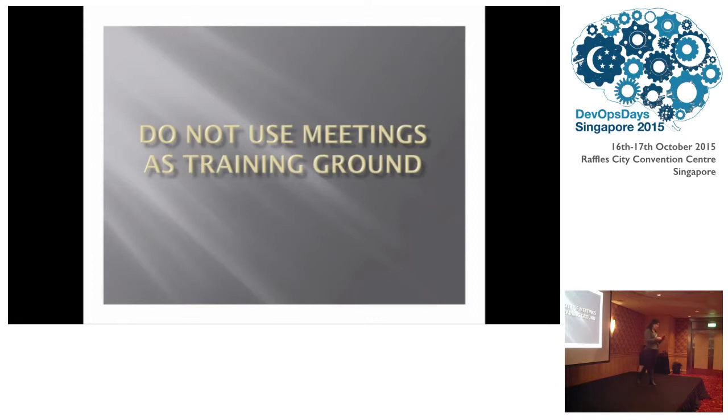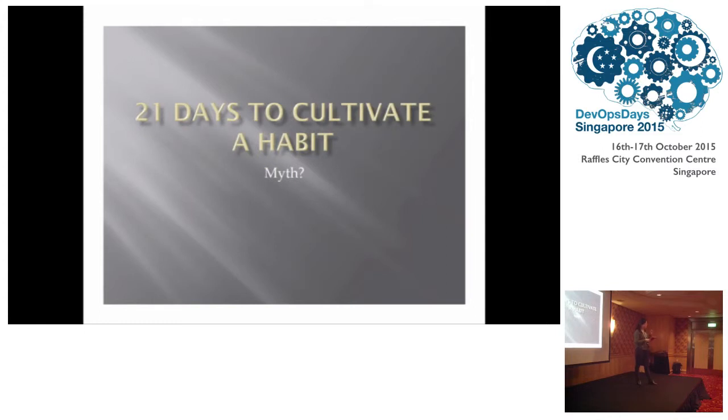But do not start explaining things in sprint plannings or stand-ups. You'll be undermining the scope of these artifacts. Note down the questions, answer them later if you want, but it's very important to keep the meeting for its intended purpose. It takes 21 days to cultivate the habit. This is actually a myth, and yeah.